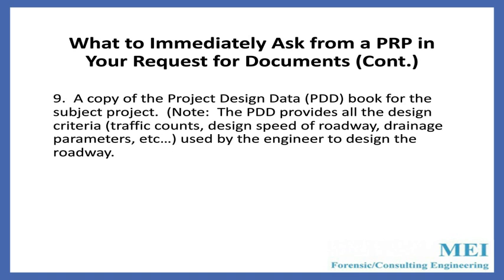Here's something you don't see asked for a lot: a copy of the Project Design Data Book, the PDD. This is something put together by the engineer that shows what traffic counts were used, the design speed of the roadway, drainage parameters — was it a 20-year storm or a 50-year storm — what were the passing sight distances based on speed, and all the design parameters used by the engineer to design the roadway.